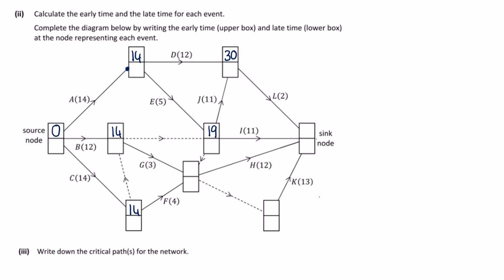Let's go back down to this one here. It was really hard to see this little dummy one between these two when the box came in, so easy to miss. So our options are, we have the dummy, which is 19, we have G, which is 17, and we have F, which is 18. So actually our maximum here, the biggest of those values, is going to be 19. Here, this is just a dummy activity, so this is going to be 19.